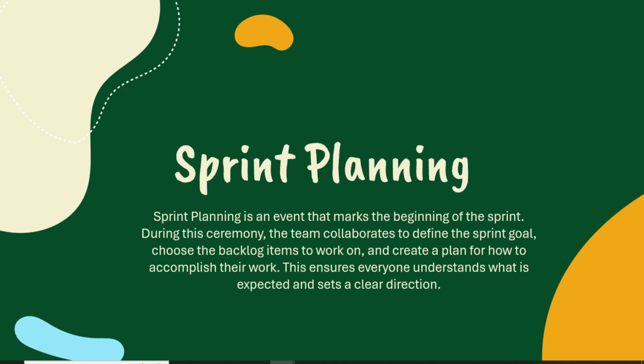defining the sprint goal. During the sprint planning, a clear and concise objective of the sprint is set, and that goal is what should be achieved during the sprint. It provides direction and focus for the team throughout the sprint. For example, in our case, an example would be to optimize a business service response time tracking using historical data.